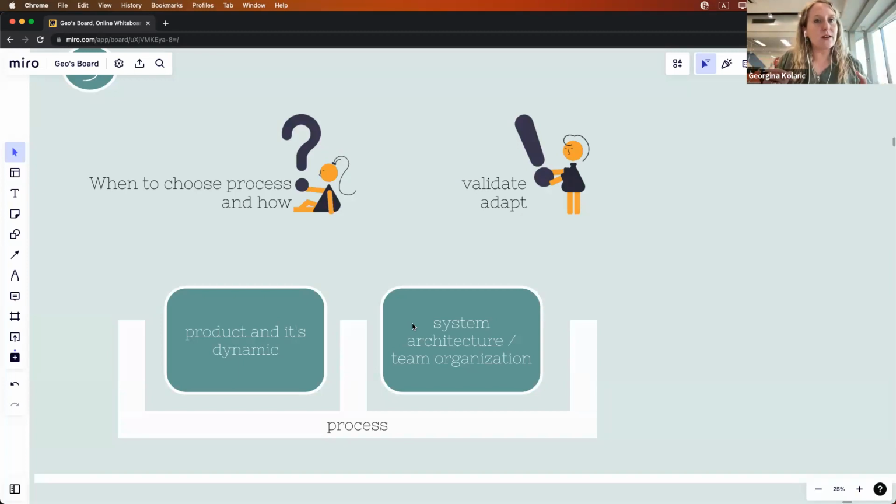For example, when we start, maybe we'll not have that clear requirements. We need to prepare a lot of things, maybe to work as Kanban or Scrumban in the beginning. Then in the middle of the product life cycle, we will have some longer, peaceful iterations. We can say, okay, let's now use Scrum. We can afford peace to the team and to the project for a week or 2 weeks, doesn't matter.